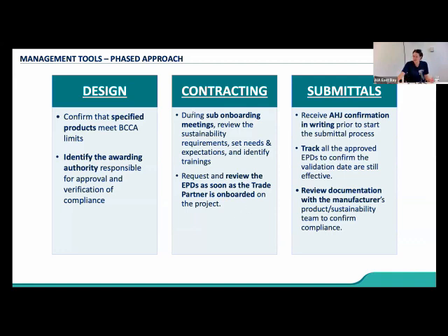As a contractor, one of my favorite lessons learned is that the person that estimates the project and signs the bid form is often not the same person managing it, right? Oftentimes there's a disconnect between the person who signs the company up for complying with Buy Clean and the person who actually has to procure the material. One way to make sure that handoff is clear between those two firms is by having a sub onboarding meeting and also a closeout meeting at the time of bid.